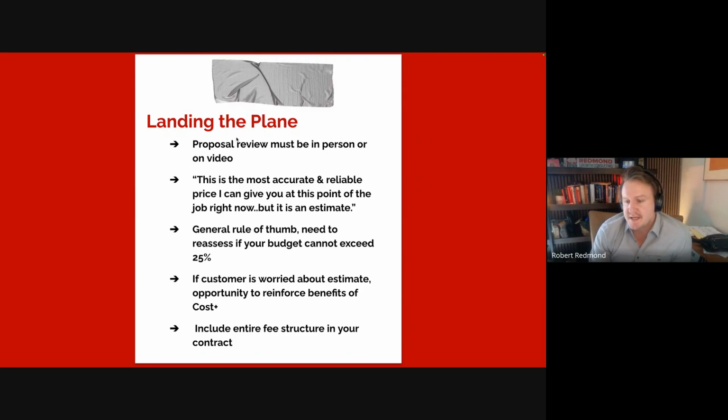I would also say that doesn't necessarily surprise me. Because if you do cost plus poorly, like if you're not really reporting on financials, the nature of it is you're going to get into a dispute, right? Because at some point you're going to say, well, you owe me more money. And the customer's going to be like, I don't owe you more money, right? And there's going to be some sort of dispute. That's why it's so important to make sure the steps in that contract are followed up front, and those expectations are clearly established from the get-go, right? Great, thank you.